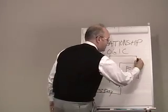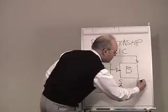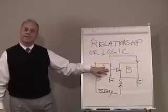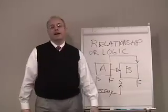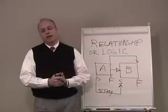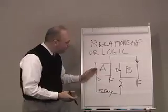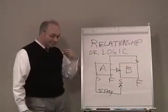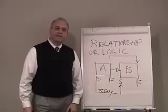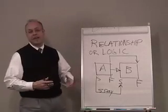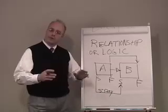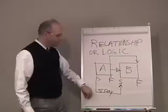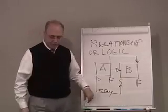Another kind of relationship is a finish-to-finish relationship, which says that activity B cannot finish until activity A finishes. For example, I can't finish roughing in mechanical until I finish putting all the studs in place, and I can't finish painting until I've finished the drywall. The last kind of relationship — start to finish — is technically possible but not recommended and rarely seen. So logical relationships are basically the connections we make between activities.